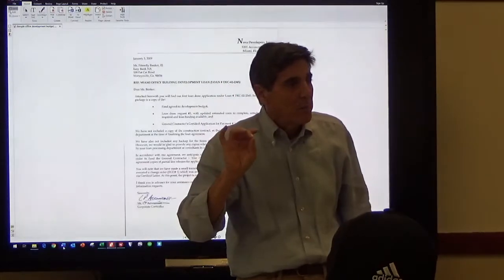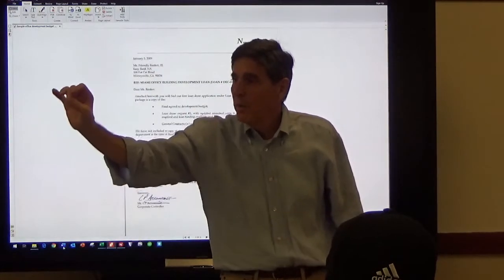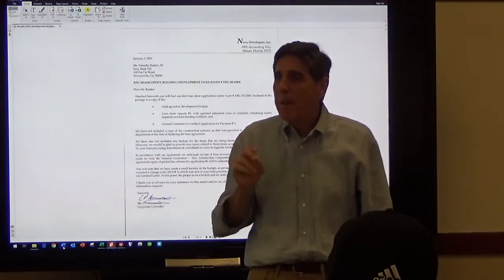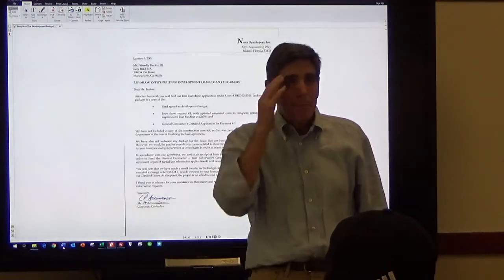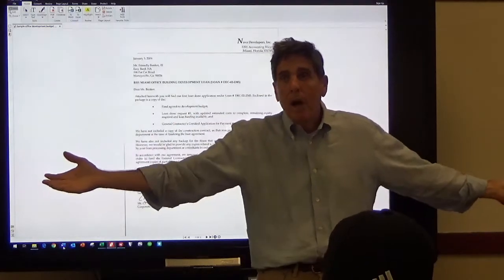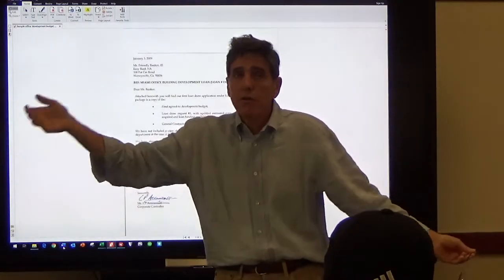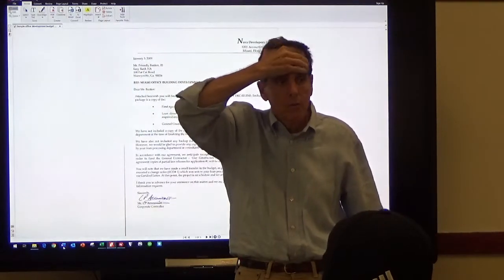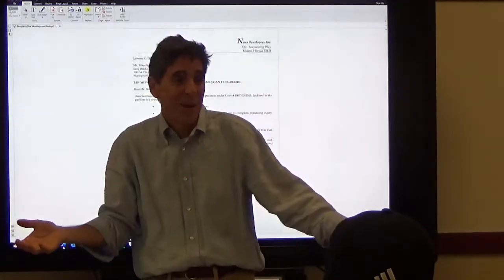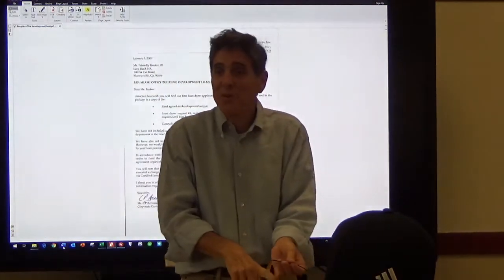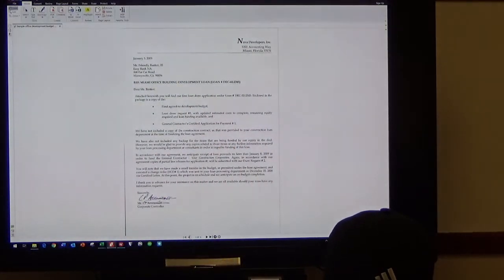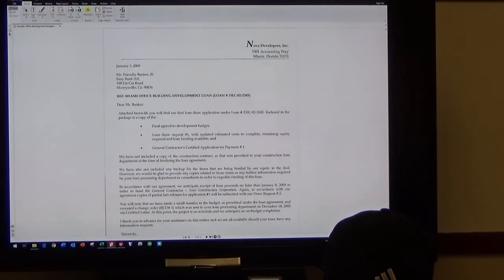Inasmuch as there is a very standard process for construction companies to bill their clients, there's no structured process for clients to get funded by banks. We used to just put a letter together. When I started teaching 10 years ago and was putting this case study together, I called a bunch of friends who are lenders, and they said, we just get a letter with a request. They make sure that the 702 is there, and that's it. So I put together a package. What would a package look like that you would send to a bank to get reimbursed?